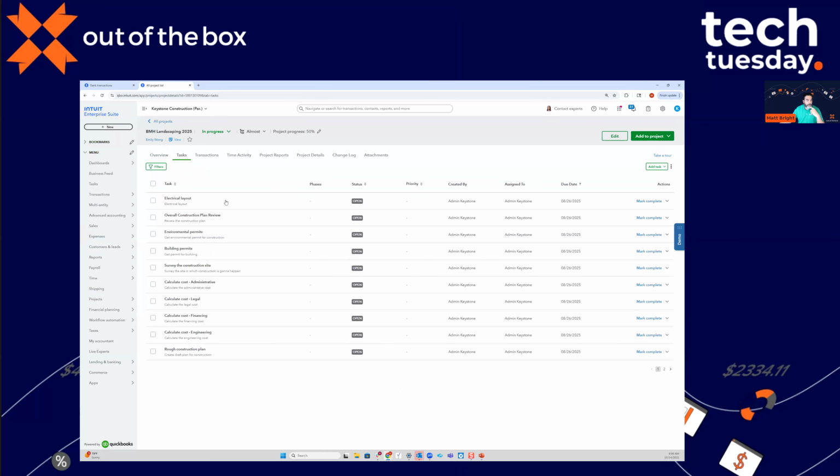Tasks, this is kind of cool. If every project you kick off, hey, I need to do draft work, blueprint work, I need to go do a site inspection, I need to go start permits, you can set up these tasks so that every time you kick off a job, it'll let the rest of the team know, hey, here's all the things we need to go do for this new project or new job that we're bringing on board, this customer we're working with.